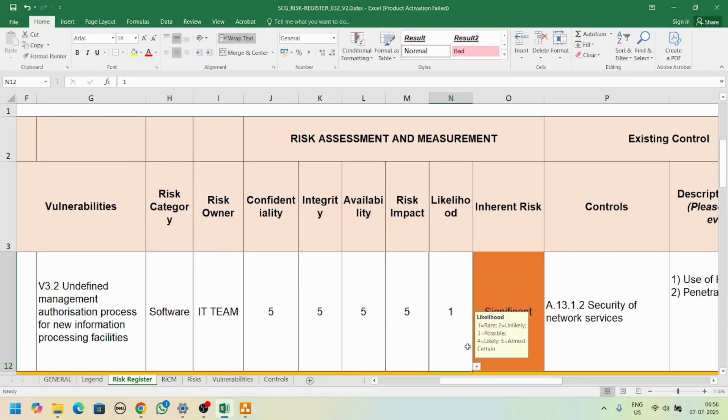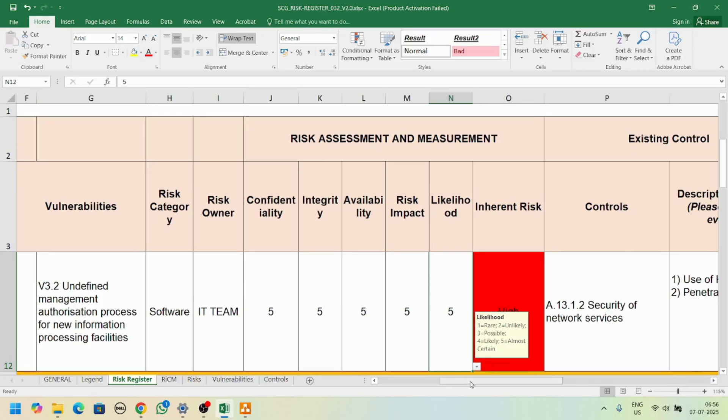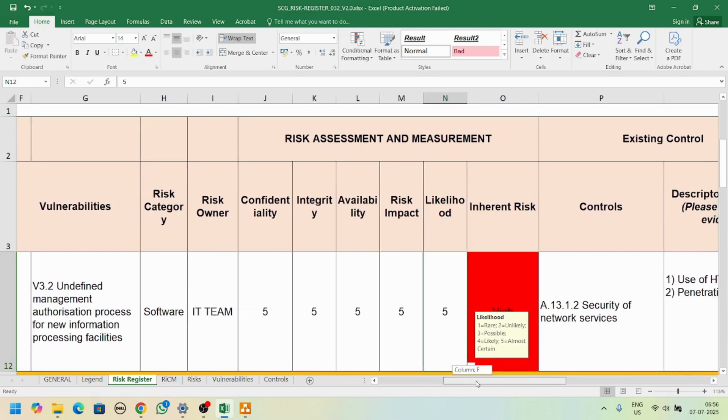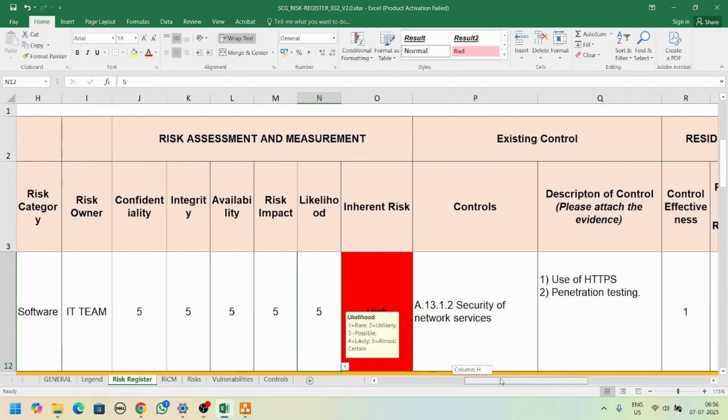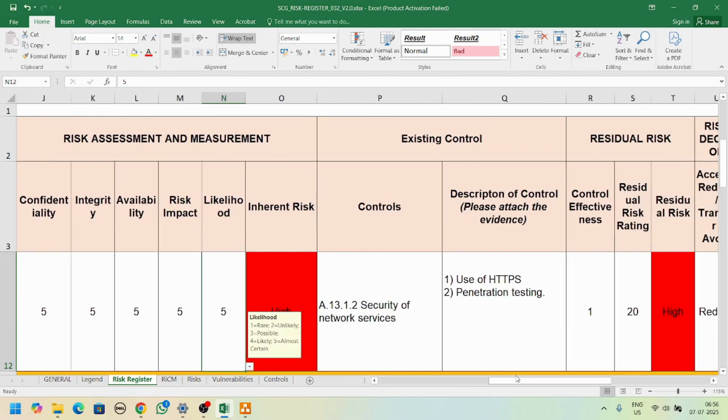Let me go to five. What's the risk likelihood? It's rare, unlikely, possible, or almost certain. If you go almost certain, then it's a high risk and we need to mitigate it as soon as possible.